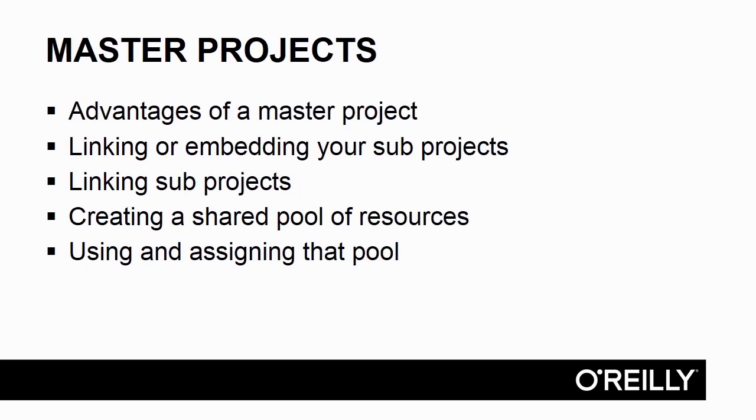We explored master projects, the advantages of having a master project for managing multiple projects, either linking or embedding sub-projects within your master project, how to create links between your sub-projects, and how those links are then displayed when looking at them within each of the sub-projects. We looked at creating a shared pool of resources so that you have one resource file that is then used by all of your projects within your master project, and then using and assigning resources from that pool.